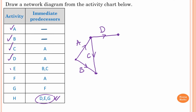For activity E, D, E, and G connect together, so I connect with this first — this is activity E. For activity F, A is an immediate predecessor of F, so we start from here and connect — this is F. For activity G, F is an immediate predecessor of G, and D, E, G connect together, so I connect to this vertex. I hope your network diagram looks something similar to this. Thank you so much for watching.